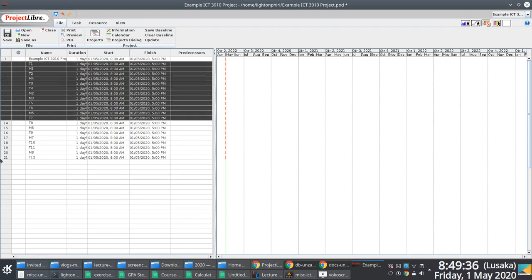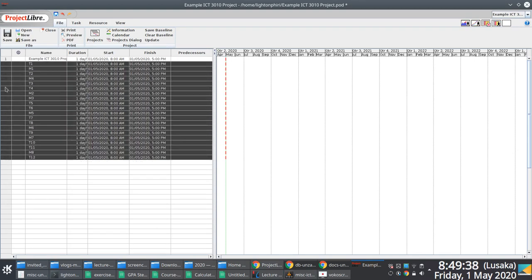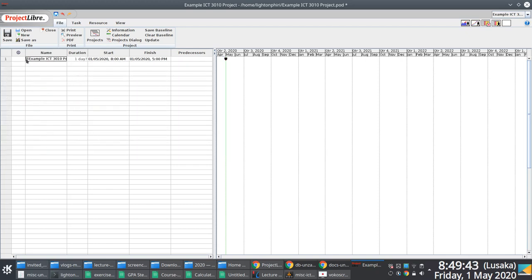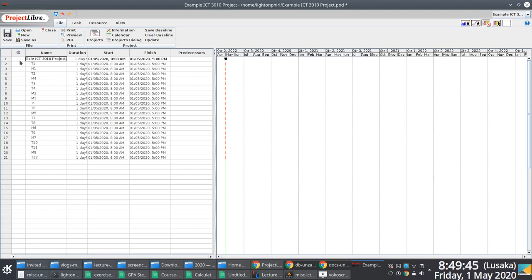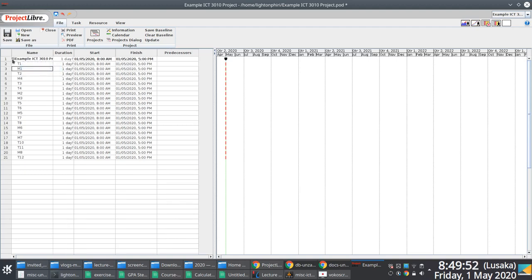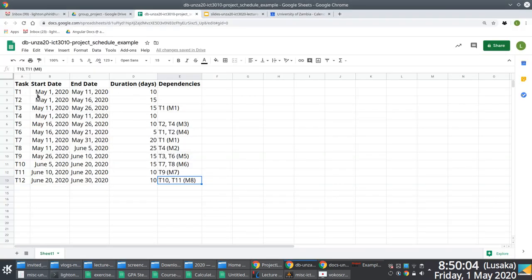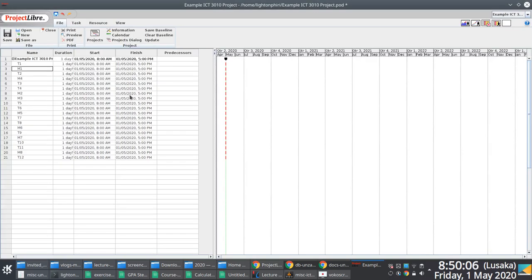And after you do that, what you want to do is highlight all the different tasks and milestones and then just say indent so that these are represented as an umbrella. Visually represent this hierarchy, really, right? All right, and I'll hide this just because it's not important for now. Just use these incremental row numbers as task IDs. Okay, now that we've done that, we can proceed with indicating the start dates and the durations, right?